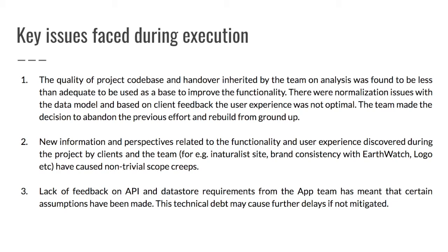After doing this, we also hit a few road bumps along the way, mostly to do with the user experience being compatible with the Earthwatch standards and following the level of professionalism shown by the iNaturalist site, which was found by the clients mid-project. So that gave us something to base it off, so a few changes had to be made there. And as said before, the communication with the app team wasn't overly ideal, and this left us with very little feedback on the API and data store requirements. This caused a bit of delay and meant that a few aspects of the code had to be rewritten once they clarified their needs to us.